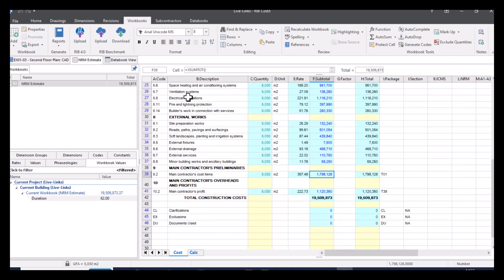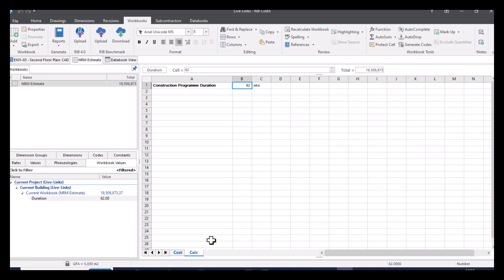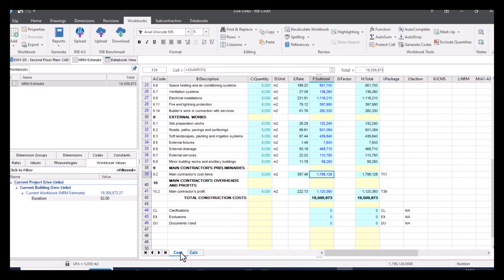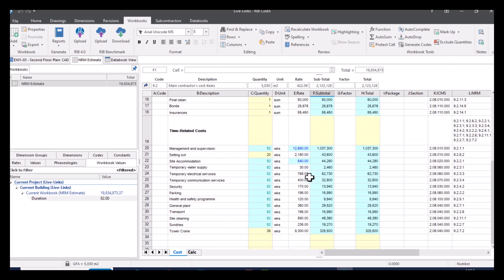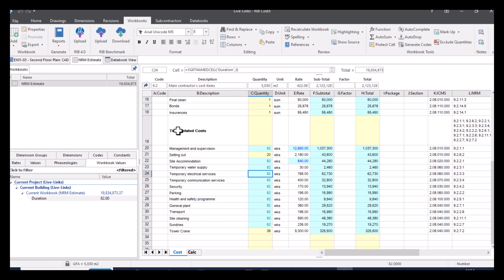So if I go back up to level one, let's say you've experienced some delay with your programme duration and it's now actually going to be 82 weeks instead of 62. Just going to update that there and then go to my cost tab, and then go back into my prelims and you can see that that's now updated to 82 weeks. So once again, I've not had to manually do that. I've only had to adjust it in one place and then it's adjusted it everywhere on my workbook for me.